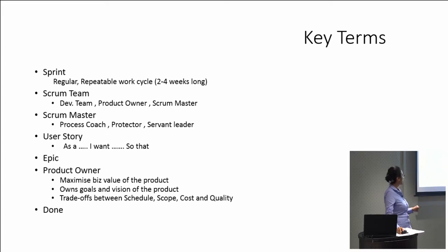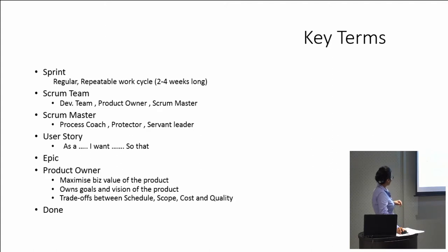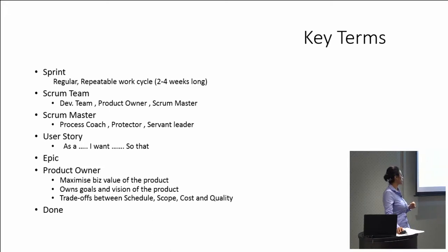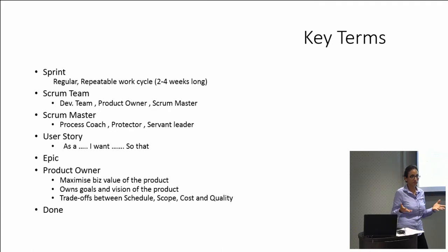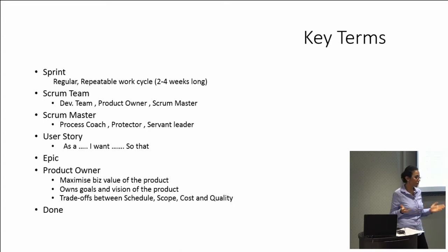The next term is epic. Epic is a big user story — something at a very high level that hasn't been thought through or refined. For example, 'I want a particular feature to be available on mobile.' The product owner's main responsibilities include maximizing the business value of the product, owning the goals and vision of the product, and deciding trade-offs between schedule, cost, and quality. The next key term is 'done' — the definition of done is given by the scrum team itself, defining when a sprint is considered successful.